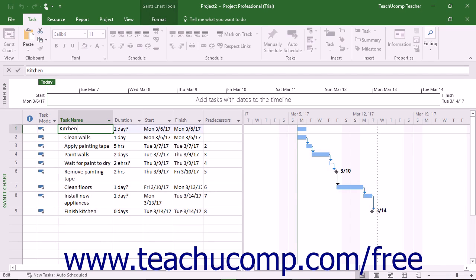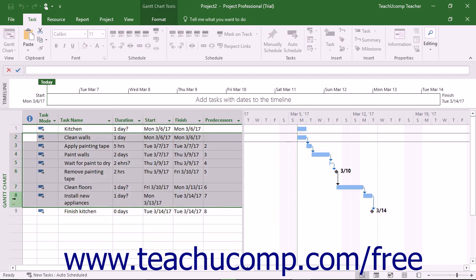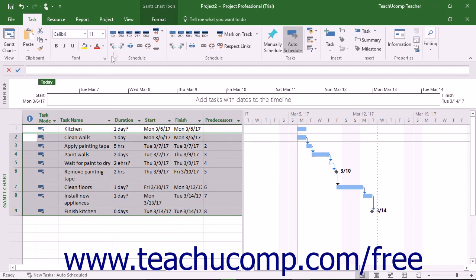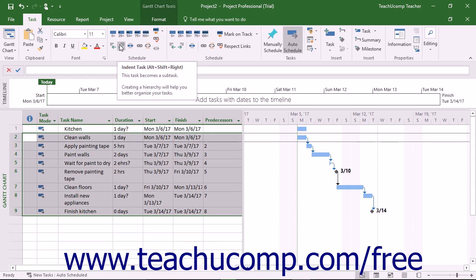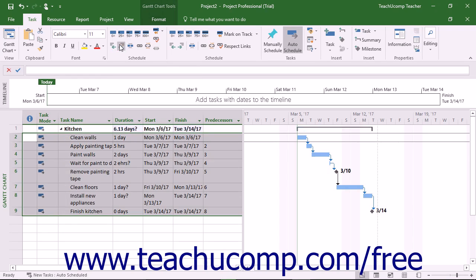Next, select the tasks below the summary task that make up the subtasks within the phase. After selecting them, click the Indent Task button that appears in the Schedule button group on the Task tab in the ribbon. The selected tasks are grouped as subtasks below the summary task or phase.